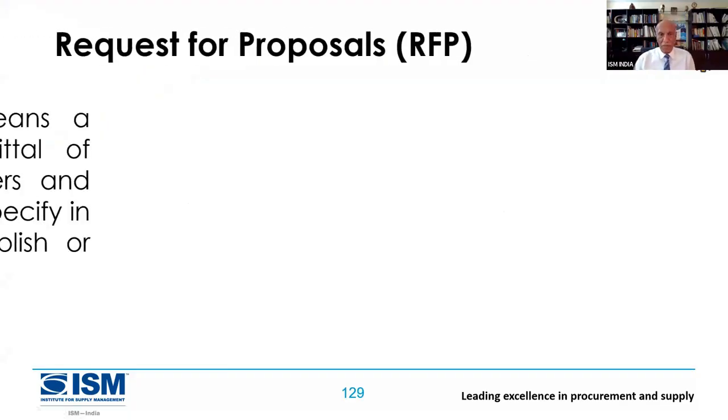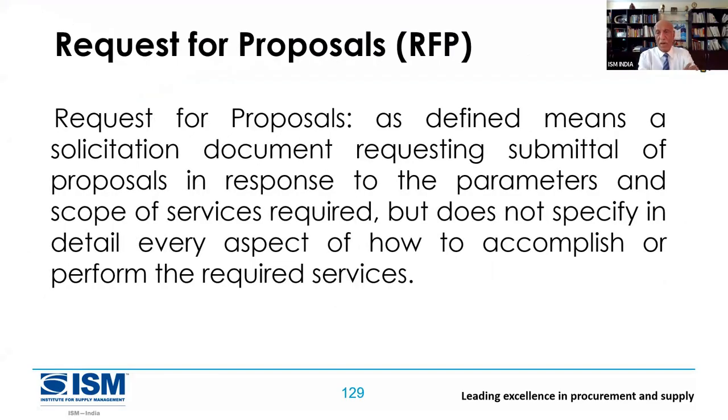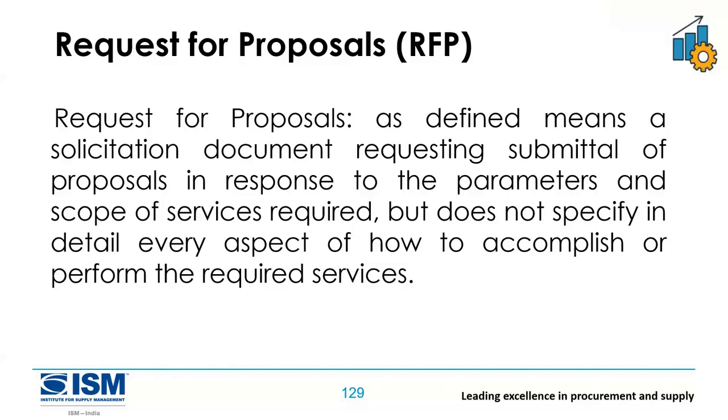Request for proposal, RFP. So RFP, RFQ, I want to hear from you. Where do you use RFP? Where do you use RFQ? When to use RFQ? When to use RFP? Anyone? When we have just a concept and we need to work on budgetary estimations, then we go for a proposal. And once we fix the specifications and the specs are frozen for us to go ahead and purchase the materials, then we use the RFQ.